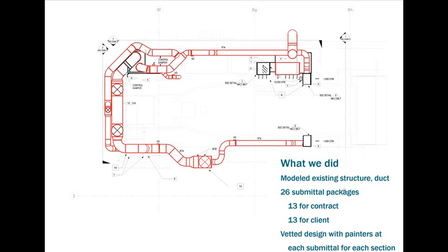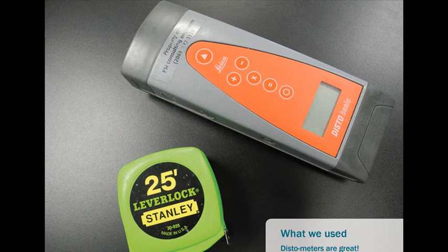So during like a 60% design, and I'll touch on this a little bit more, we always ask for review comments, or give us your comments, feedback on what we're currently showing in our design. But in Revit, because it's in 3D, and that's the way a lot of the users, painters, owners, whoever it is out there, view everything, their feedback and their comments are way more valuable because we can make the change when you might not be able to see that on a 2D drawing.